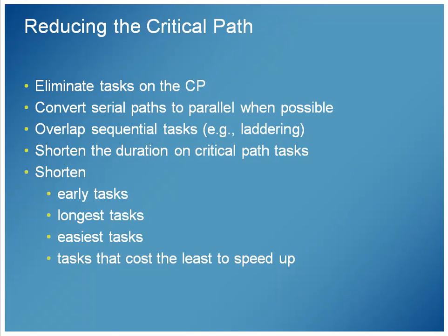And when you're looking to shorten, some strategies, heuristics, rules of thumb are to look at the early tasks. They tend to be a little easier, a little more specific in our knowledge, and sometimes easier to shorten up. As you get toward the end of the project, it's really hard to know what you're going to be dealing with, and if you have to leave a little bit of leeway in there, you're probably going to need it at the end more than at the beginning.